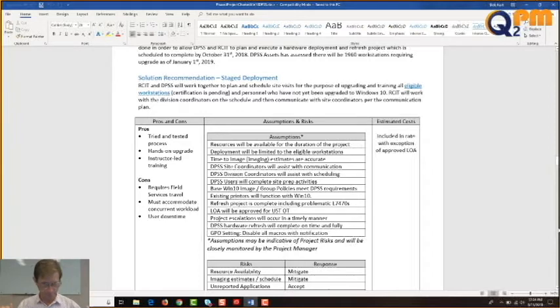What do you mean by project escalations will occur in a timely manner? That means if I see, let's say for example, I have a team member that is not performing their role, I'm not going to let that languish for 2 or 3 or 4 weeks before I take action, just giving him or her more time. I have a very particular process. You get one notice. If you don't respond by that time, I respond back and escalate to your supervisor. If you don't respond to that, escalate to the manager. I follow that process every time. Don't wait around, because otherwise those problems just get worse.